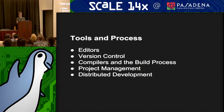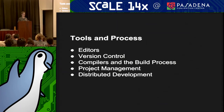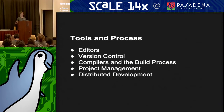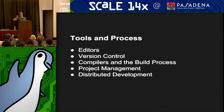Waterfall is something that happens especially in tightly controlled environments. Iterative, by contrast, means you say: we're going to work on this feature for two weeks. Within that process there's going to be some design, some development, some copywriting, and at the end of those two weeks you're done. Maybe you didn't get as far as you wanted, so you spend another two weeks on it. You keep going around this iterative process until you end up somewhere.